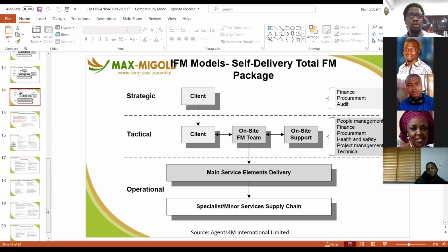In the managing agent model, the client takes a lot of risk. Because if a subcontractor does not perform, there's only so far you can go with the managing agent in terms of getting them to force your own contractors to do good work for you. They can teach, train, supervise, and do all that, but they can't do too much. So you as the client, in holding back that control, also hold back some of the risk that this service might fail, right? Now, in the principal contractor model, the risk is now removed completely from the client.